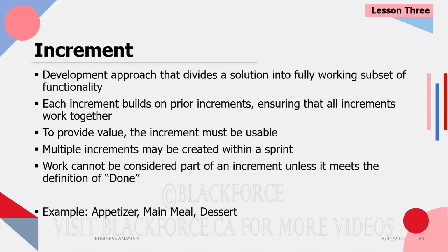Within one sprint, you can create multiple increments depending on how big they are and how big your sprint is. Like I said, a sprint can go from 2 weeks to 4 weeks. You as the BA, you're not the one determining how many increments or how many user stories are going to be built in the sprint. As a matter of fact, when the developers are selecting the user stories and saying we can build 5 user stories, there is no expectation for you to talk as a BA because you're not the one building it. You don't know how much effort they're going to put into it.